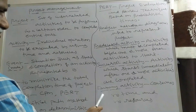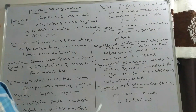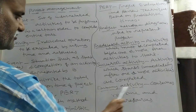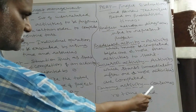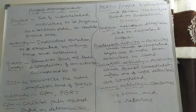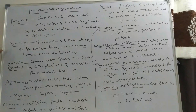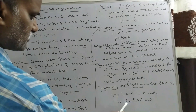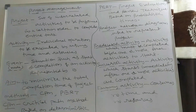There is another type used in network construction: the dummy activity. A dummy activity consumes no time and no resources. Each real activity requires some time and resources, but a dummy activity requires none — similar to slack and surplus variables in linear programming.